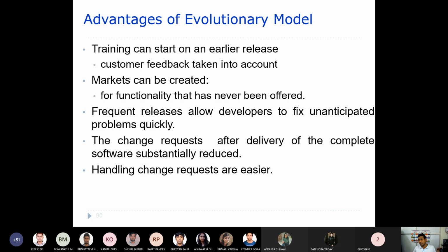Now when they give feedback, or they give some change request, I mean they will have some request to change the software, and that will be handled through which phase? That will be handled through which phase? Anyone? Maintenance. Yes, that will be handled through the maintenance phase. Now I told you before also, if you handle something through the maintenance phase, the cost will definitely increase.